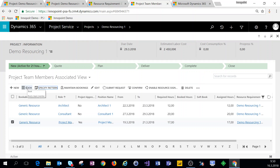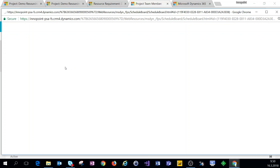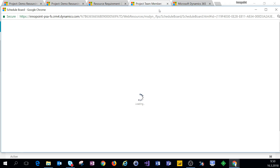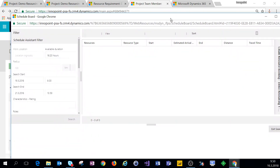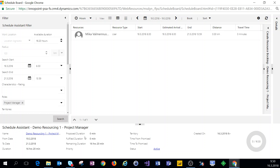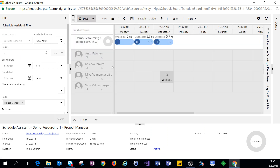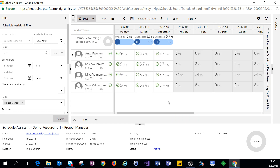We'll select the record and click 'Book.' A pop-up of the schedule board opens up, and since we're booking from the context of the resource requirement using the project team member view, the schedule board that opens is already looking at the specific criteria that the resource requirement has. Let's change to today's view to see the bookable resources that match our resource requirements.